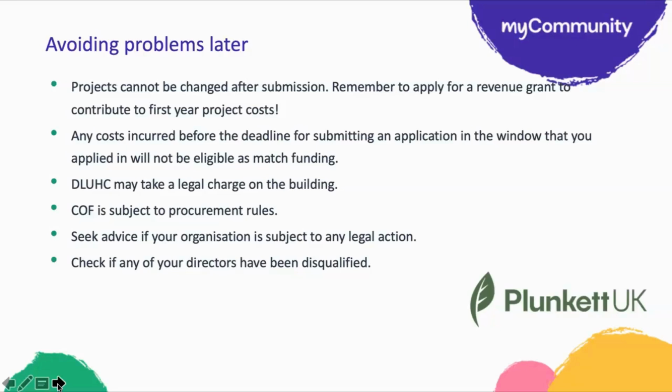So that can be a real pain. The biggest factor there is the timing. To actually go to tender takes time, takes a fair bit of work. And so in terms of planning a project and the timescales involved, that's a significant consideration. But if you don't follow those procurement procedures, then COF may say, well, sorry, you're not having the money. So it's important to know that.